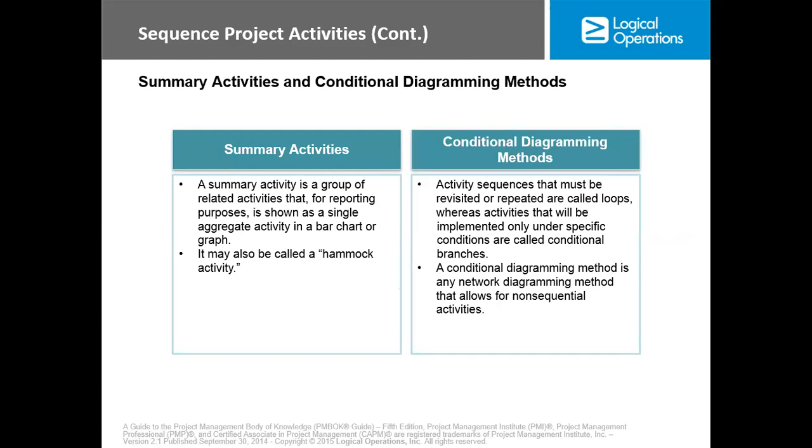For example, in a construction project, you can have maybe an activity called foundation complete. That foundation complete is a summary activity that has several other activities that make up the foundation. Now, for reporting purposes, with that activity, you can determine how long it took to complete the foundation and what it cost to actually complete the foundation of that building.